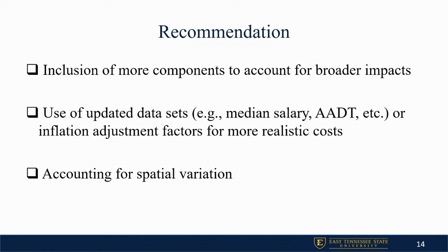For example, the value of time for a rural location will differ from that of an urban location, as the annual income, wages, and compensation will vary by location, and even the emission rates would also vary by location based on how intensified the work zone situation is.